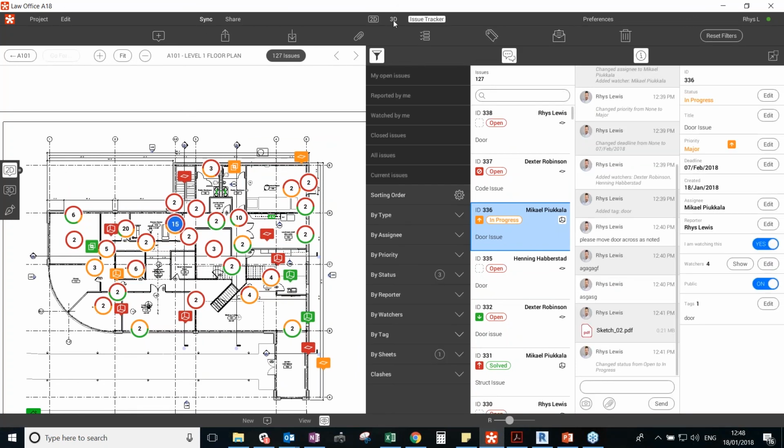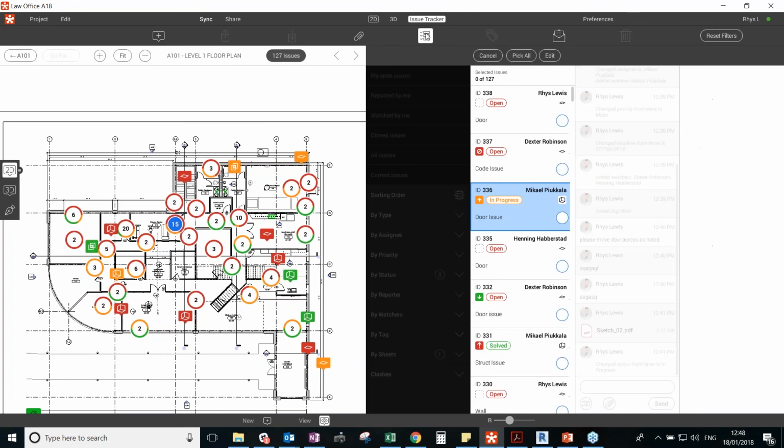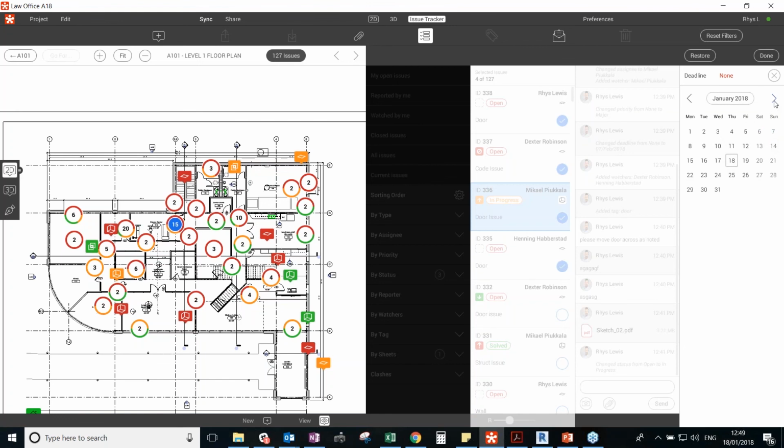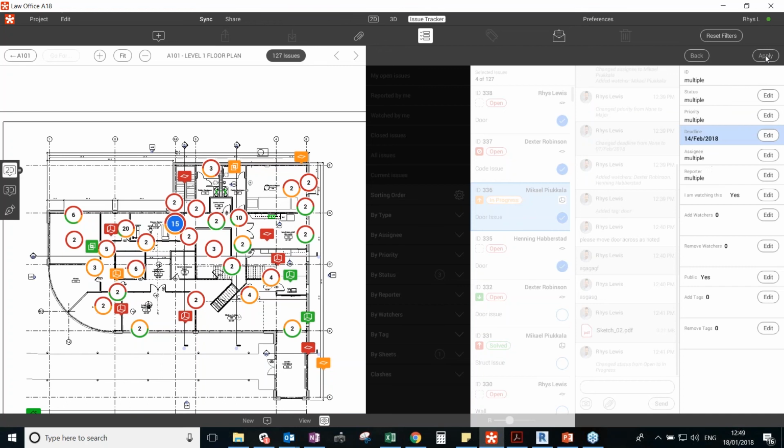Attachments here, sorry that most of the pictures are of me, but you'll be able to see here that, out on site or in conferences, we've been taking images and capturing those. As a good example, that's one of the doors that have been recently fitted out on site that have been incorrectly fitted, and that gets logged in the issue tracker and will then appear in that report.